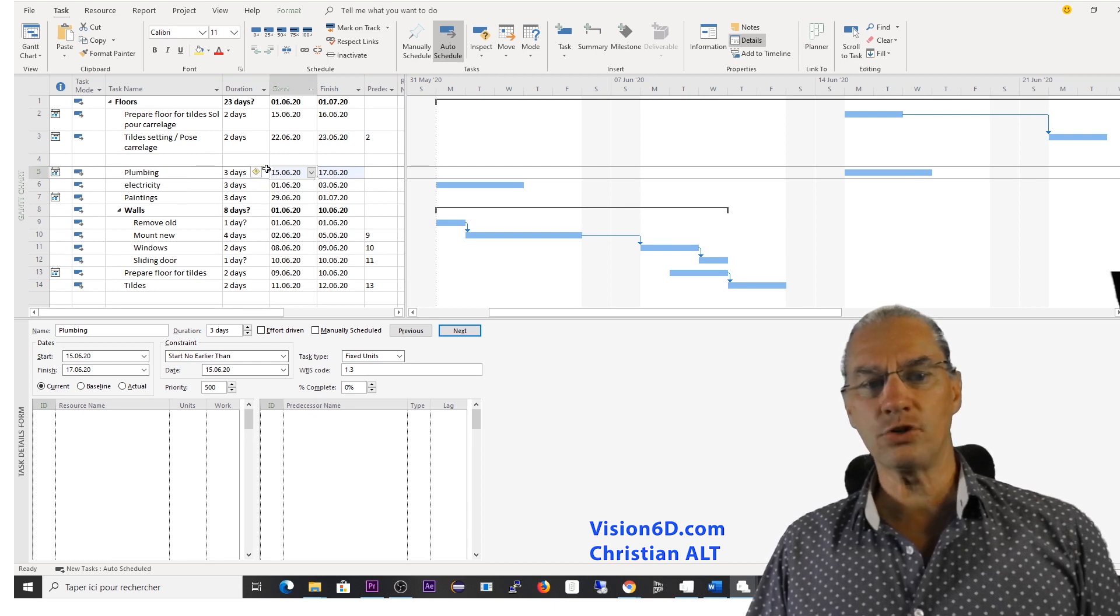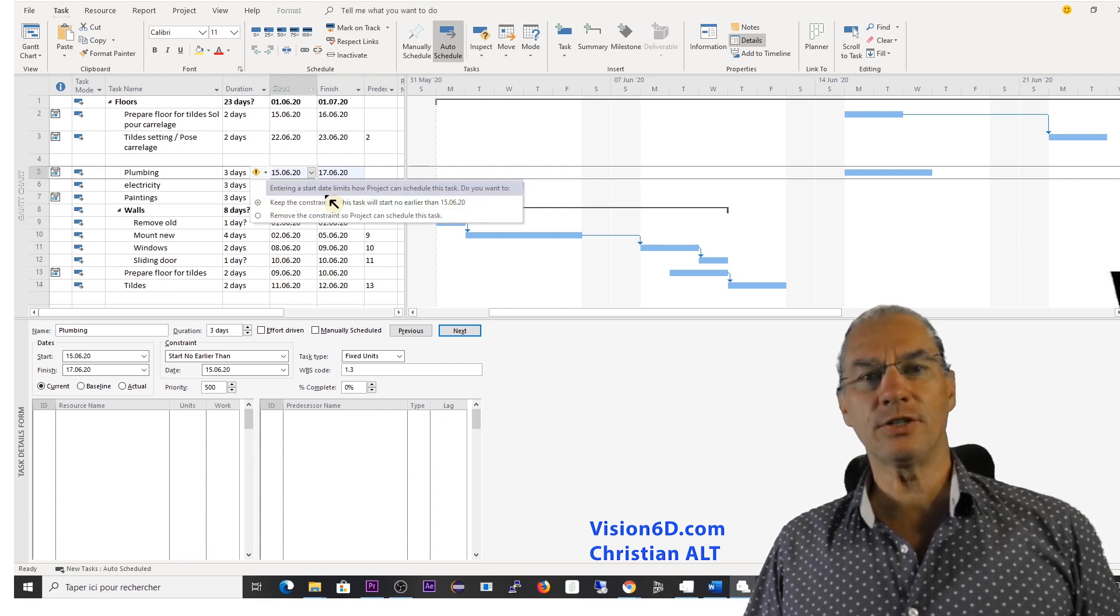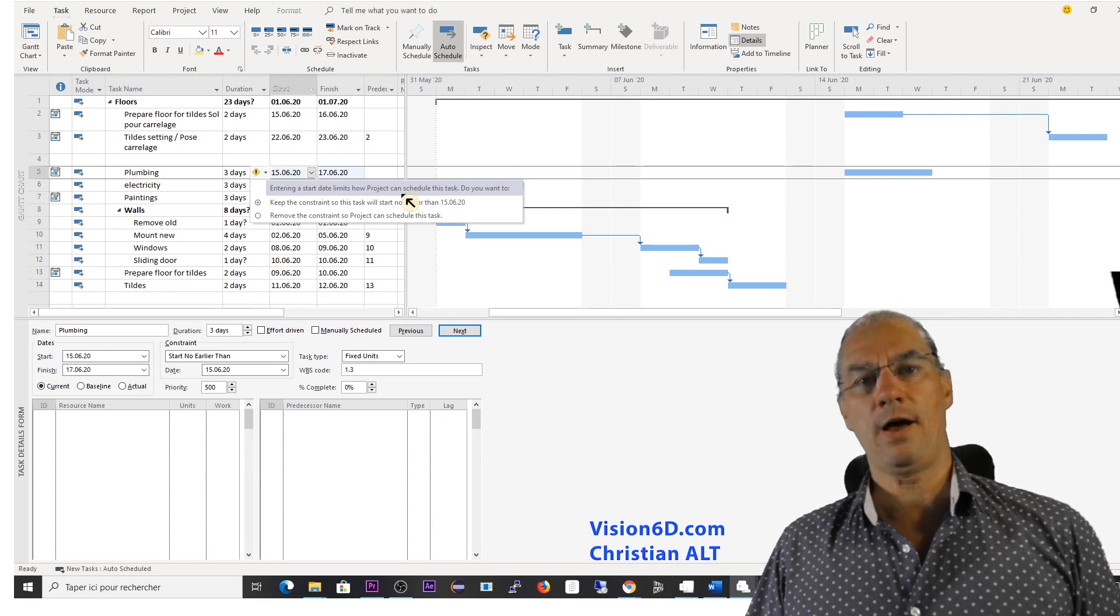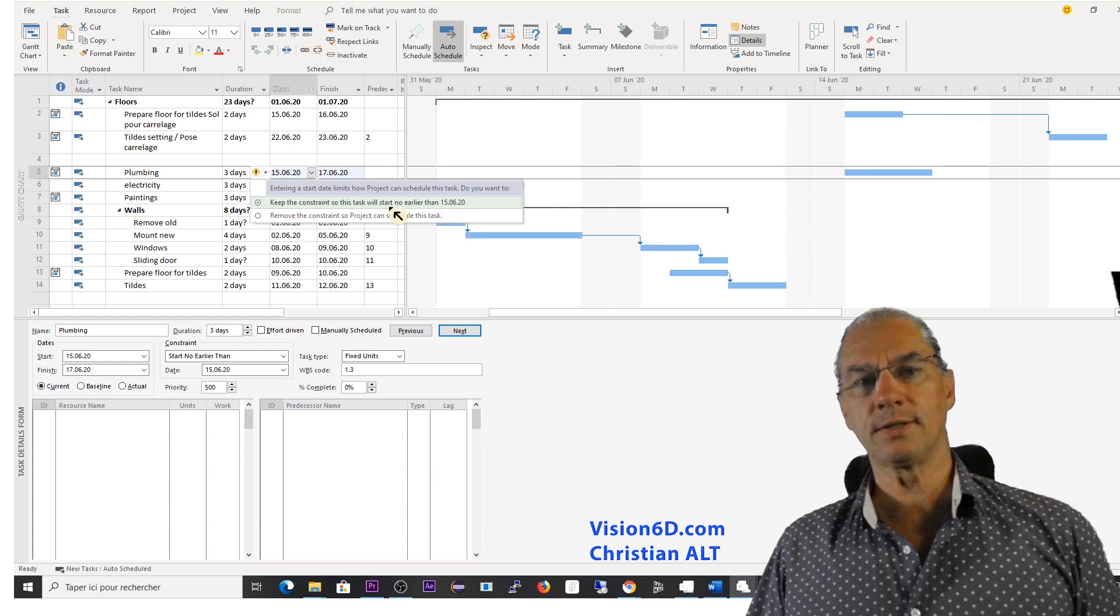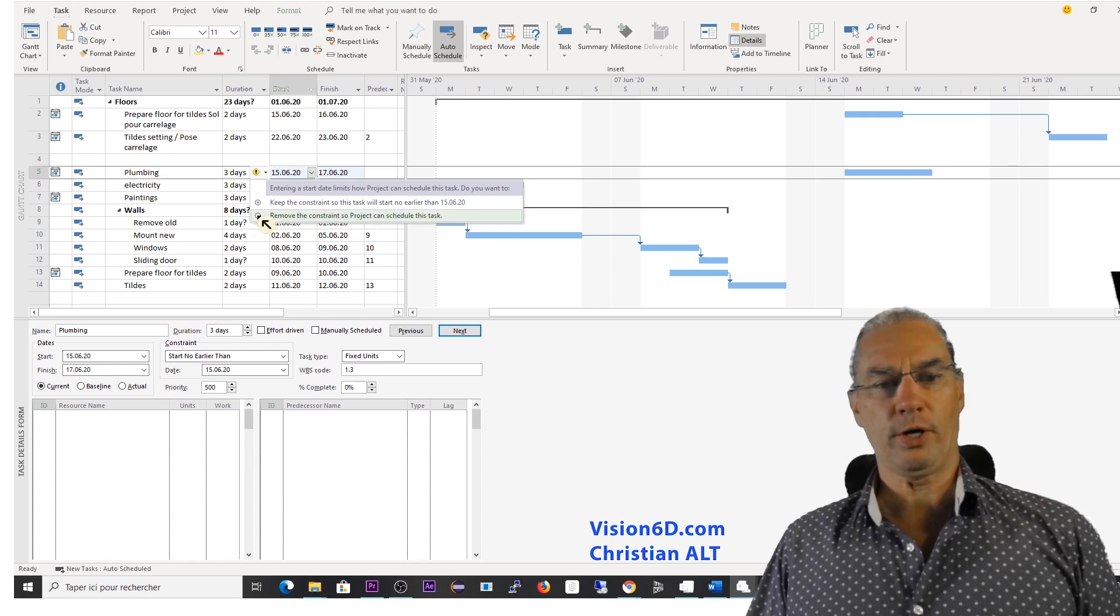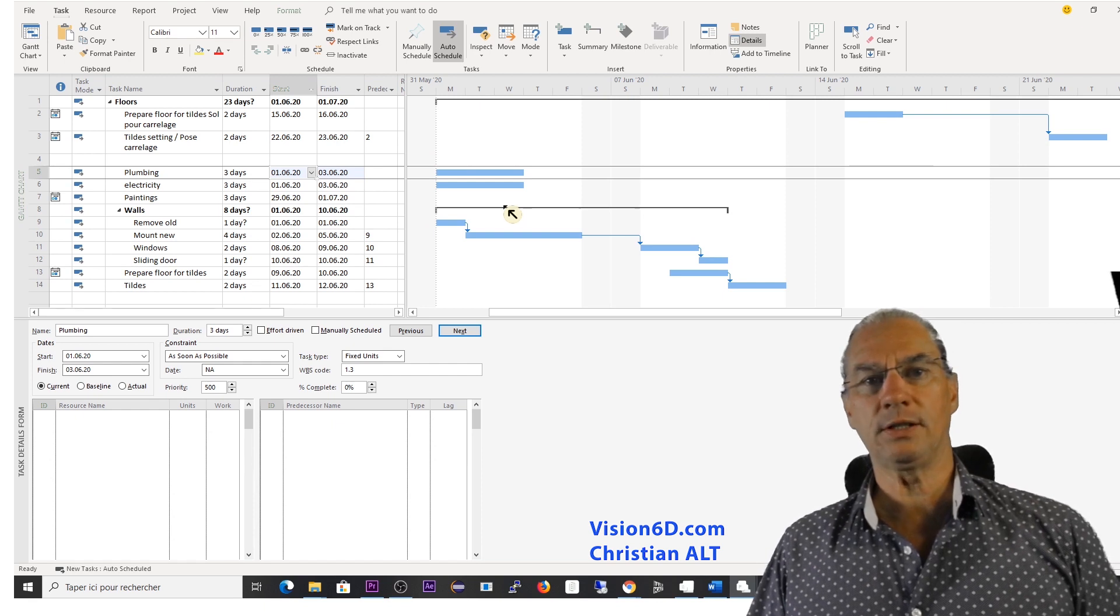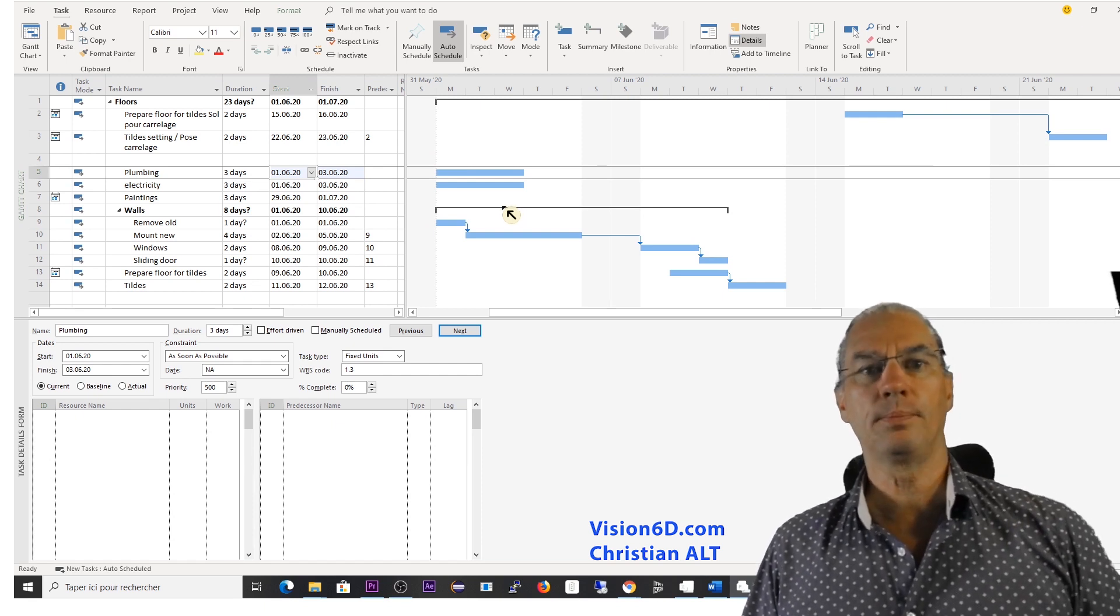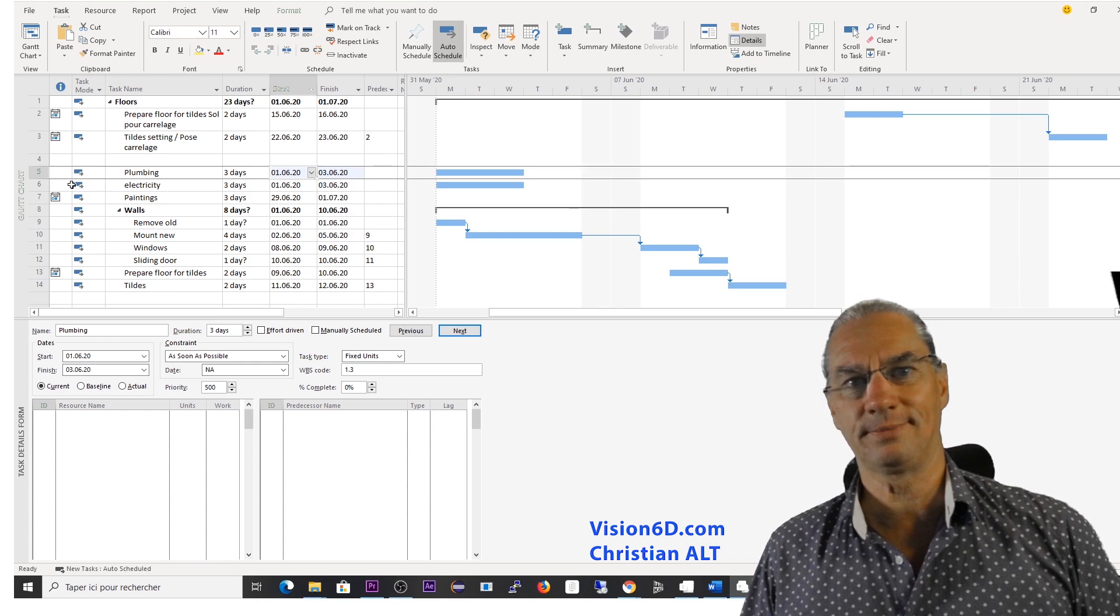Now, attention mark here is telling me that entering a start date is setting a constraint. So do we really want to keep that constraint on that date? Or do we want to remove the constraint? And we are going to look what happens if we remove it. So project automatically scheduled it as early as possible. And it has removed the icon of the constraint.